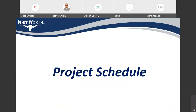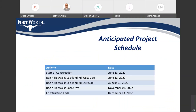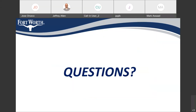The schedule we anticipate for this project: the contractor is anticipating starting construction June 13th, starting on the West side of Lackland and progressing eventually to the East side of Lackland by August 1st. Once he's completed there, he'll move on to Lock Avenue, and by November he should be wrapped up with all construction for this project — just before Christmas, in mid-December.